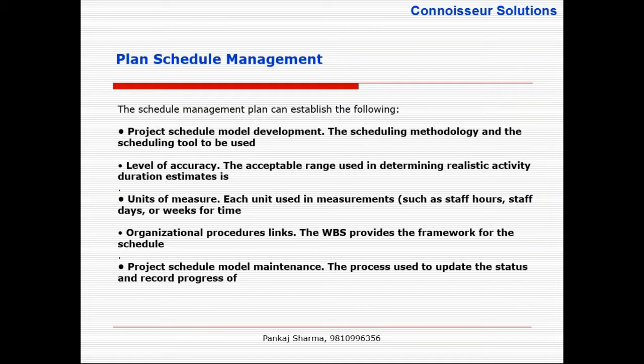And you said it's an acceptable range. Now level of accuracy will be very good when you have detailed scope. See, with definitive estimates, PMI says the level of accuracy can be from minus 5% to 10%. PMI looks at it in two different ways. One is order of magnitude, another is definitive estimates.